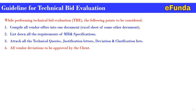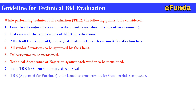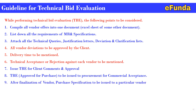Fourth, all vendor deviations to be approved by the client. Fifth, delivery time to be mentioned. Six, technical acceptance or rejection against each vendor to be mentioned. Seven, issue TBE for client comments or approval. Eight, TBE approved for purchase to be issued to procurement for commercial acceptance. Nine, after finalization of a vendor, purchase specification to be issued to the particular vendor by procurement. To understand this technical bid evaluation, one can refer to our slide or video section where we have completed the formats of the TBE, and that will be helpful to understand the guidelines for preparation of the technical bid evaluation.